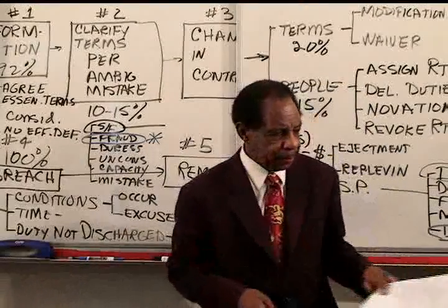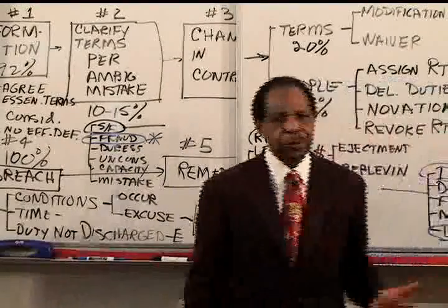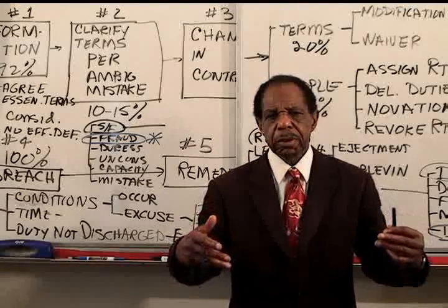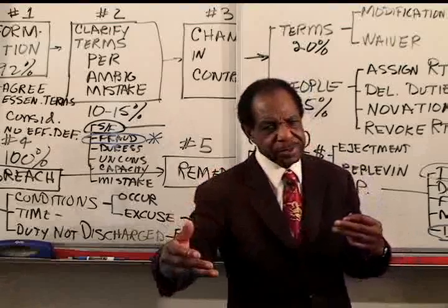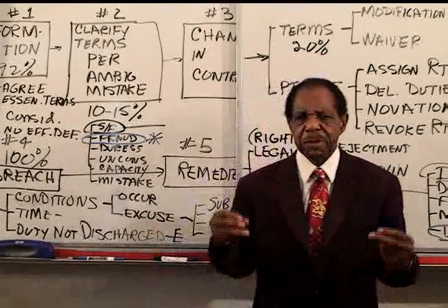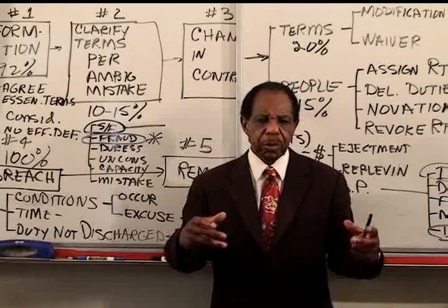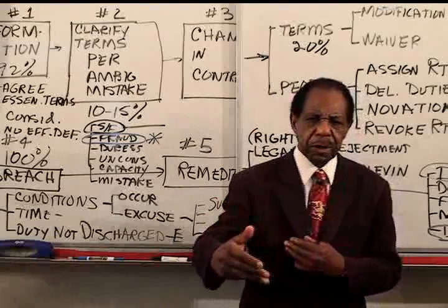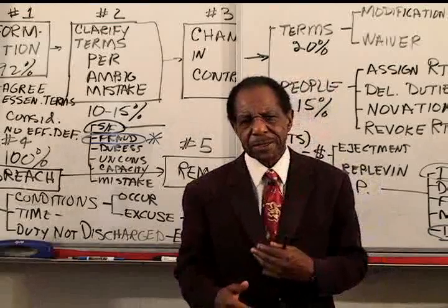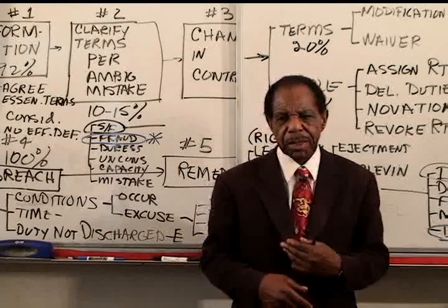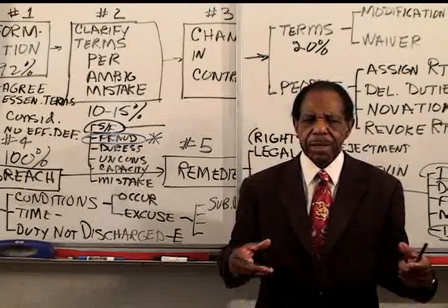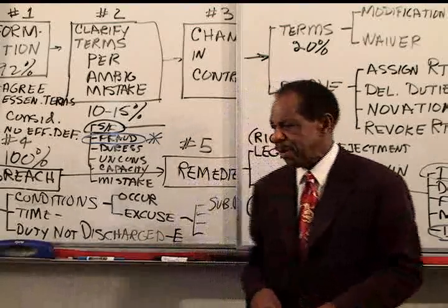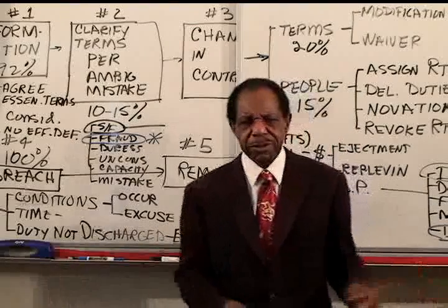And finally, I won't put all the drawing on the boards, but he put an interior wall in the garage so that they have a little storage space at the end of the garage. But the place where the builder put the interior wall made the storage space too large, and the car wouldn't fit inside the garage. You couldn't close the door. And so that obviously is a breach, and you need to have the contractor move the wall back, and that, again, would probably be a minor breach because the cost of doing that wasn't expensive.